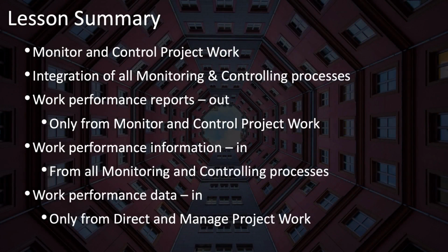And some key points to remember about the monitor and control project work process are that it is the integration of all of the monitoring and controlling processes, that it is the one and only process that generates work performance reports. It does this by gathering up all of the work performance information from all of the other monitoring and controlling processes, as well as work performance data that it gets only from the direct and manage project work process.